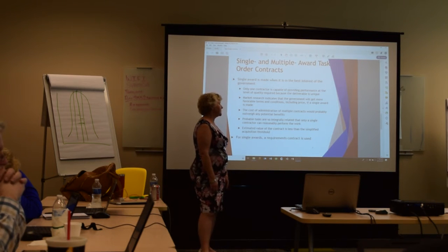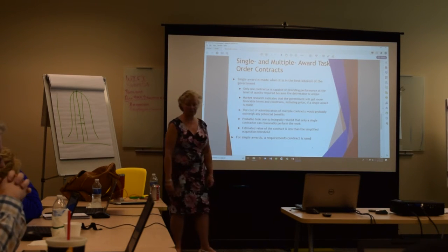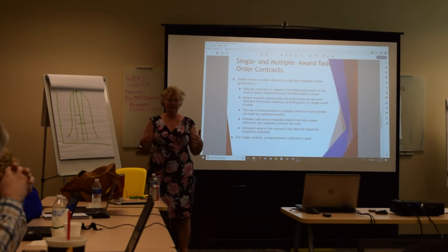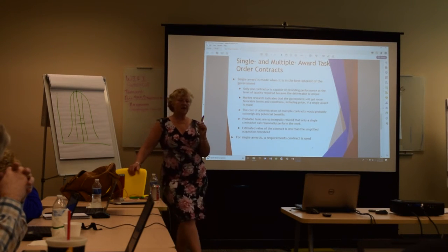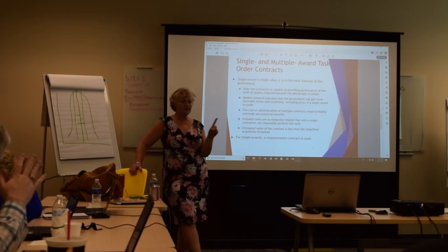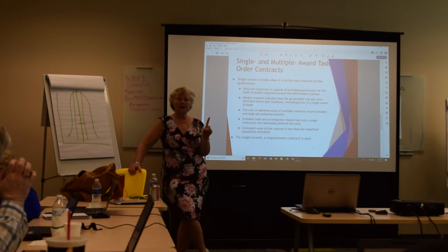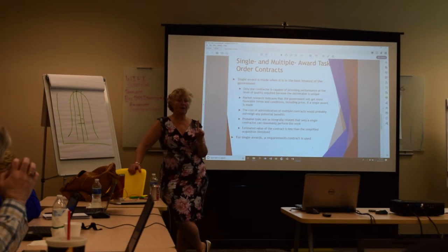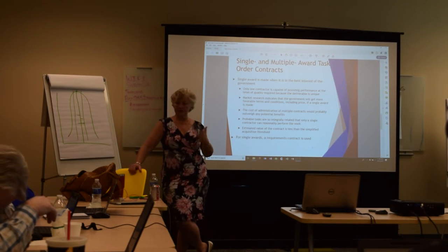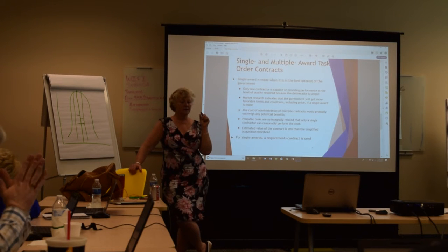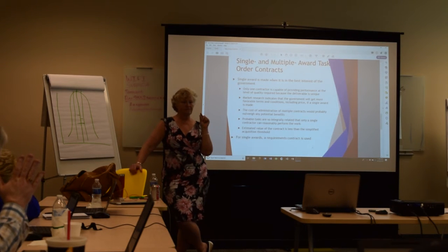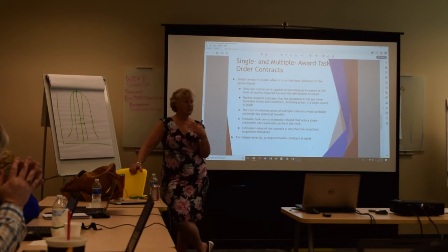The cost of administering these multiple contracts would probably outweigh any potential benefits. Okay, so the government, in their pipe dream, believes that to manage a single contractor through the life of the contract, no matter how long the contract is, no matter what a pain in the neck the contractor is, no matter how new the contractor is, it costs them $500. So when they're evaluating how to procure something, the Excel filler to equalize things and to make an apples-to-apples comparison is $500.